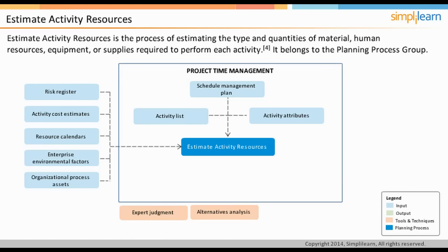This helps in resource optimization. Along with the two techniques, many organizations routinely publish their estimating data, and this could be used in activity resource estimation. Another technique that is routinely used in activity estimation is bottom-up estimating, which is decomposing the activity further down to understand it in more detail and estimating at that level. Later, all such estimates are added to arrive at the estimate of the activity.